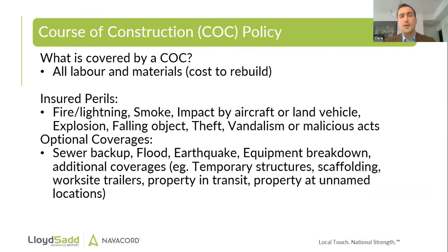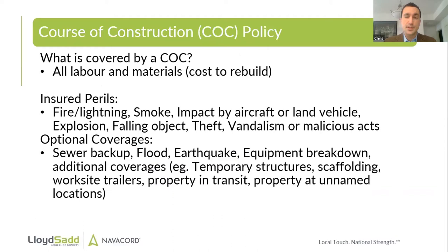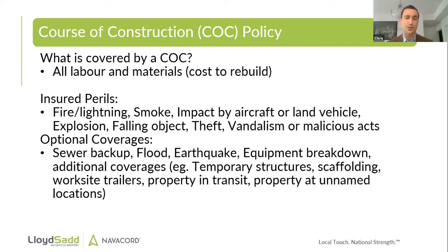So what is actually covered by a COC? A COC covers all the labor and materials — basically the cost to rebuild a project if that project is damaged by an insured peril. The insured perils are very similar to a property policy; you might recognize a lot of these perils from that. You can also purchase optional coverages when you get a COC, such as sewer backup, flood and earthquake, and equipment breakdown — again, very similar to what you've been seeing in your property policy.